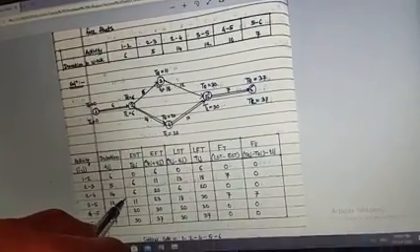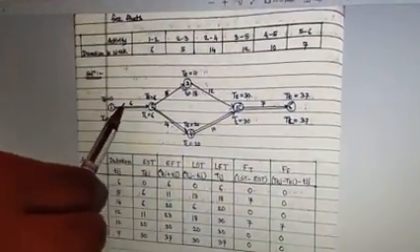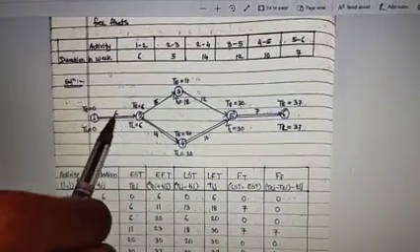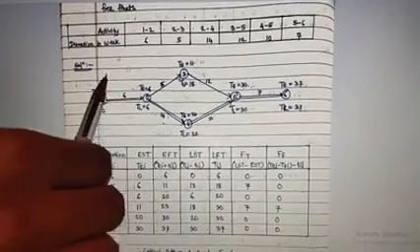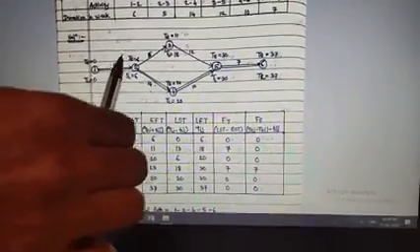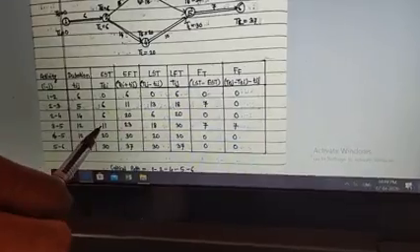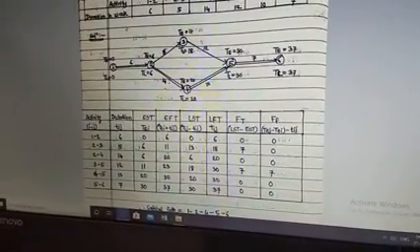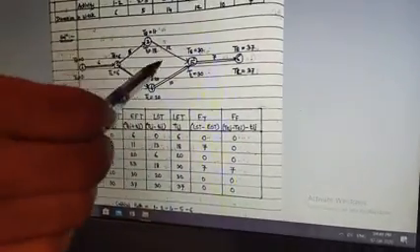So again, one simple question might have come into your mind, that is how it will be 11. Again, it is very simple. Before we go for this activity, I am supposed to conduct activity number 1 and activity number 2. But here for activity 1, the total duration is 6 weeks. For activity 2, the total duration is 5. So 6 plus 5 is going to be equal to 11. So after completion of these two activities by spending 11 weeks, then only I can go for this third activity.